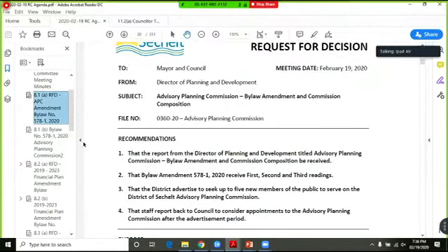The purpose of this report is seeking Council approval for applying for the BC Active Transportation Grant. The application closing date for this particular grant is tomorrow. Also, staff are seeking Council approval for financial commitment from Sechelt: $205,523 from gas tax. That covers the 30% district contribution. The total estimated cost for the project is $685,074.